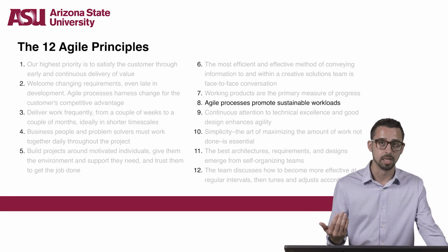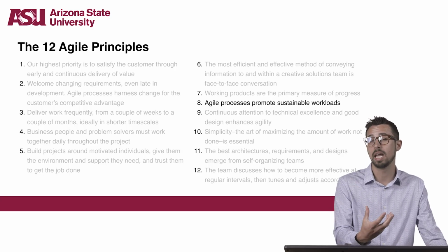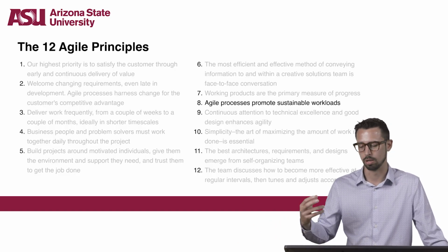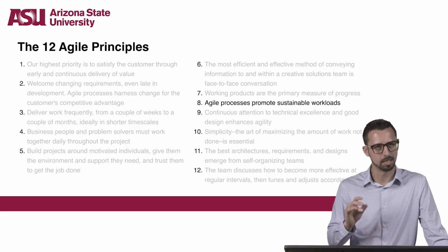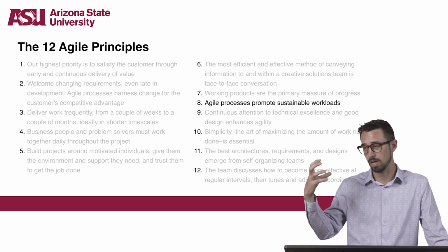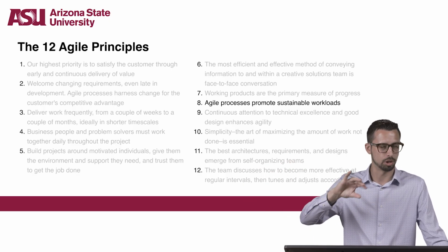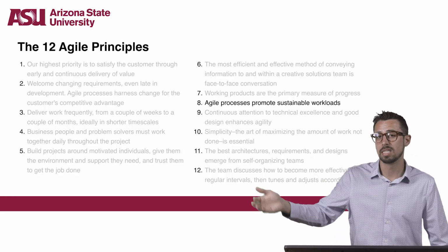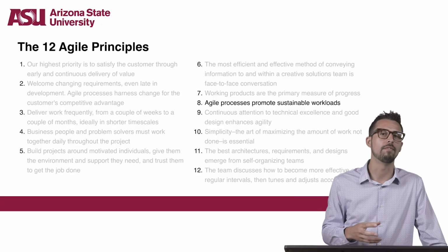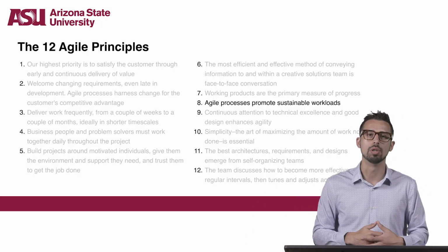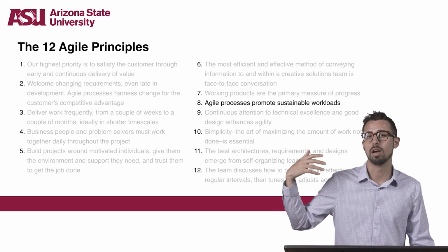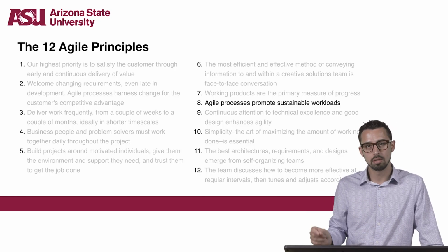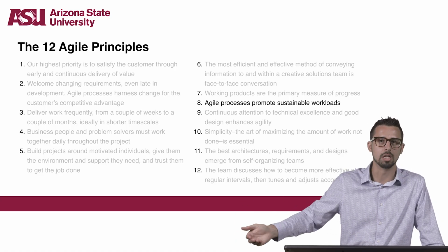Now, according to this 8th principle here, Agile projects should have a very consistent pace for each iterative cycle or sprint within a project. Maybe you've heard that term, sprint. We'll get to Scrum in a little bit, but sprints are really an integral part of Scrum projects, which are another subset of Agile. But this breakdown and consistency of the project should really eliminate the need for overtime or crashing schedules, while also promoting frequent output of, again, those workable products. It should also create a repeatable cycle that the team can continuously follow for as long as necessary.